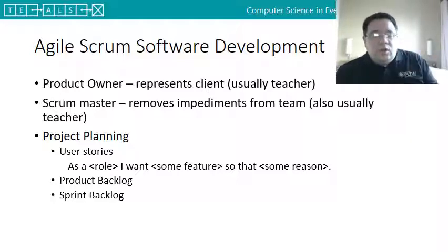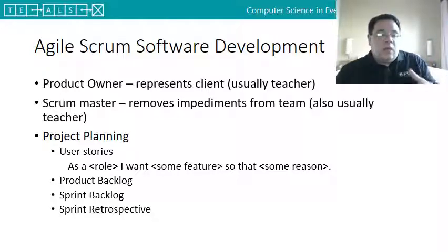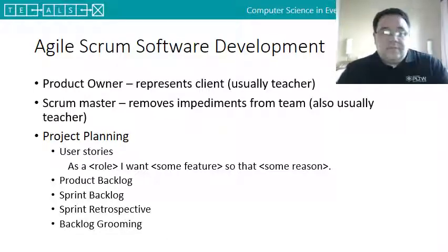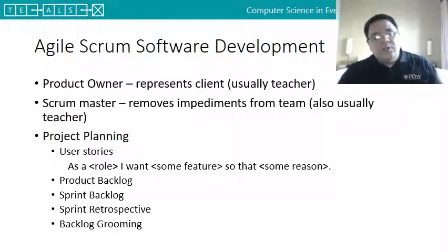I encourage my students to break down user stories in a product backlog into small, chunkable tasks that can be accomplished and are very specific. And that can help with planning for the sprint, and also at the end of the sprint looking back and doing a retrospective and deciding what are the things they got done, how did it go, and doing some backlog grooming to help them decide which things they're going to either take off the backlog and bring into the next sprint, or adjust on the backlog so that they continue to work on burning down all the different tasks to make the project.